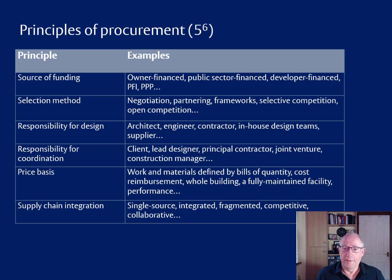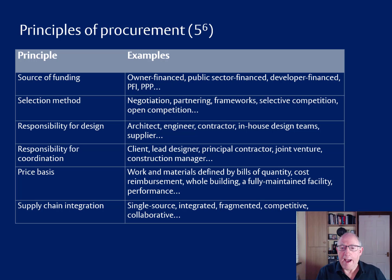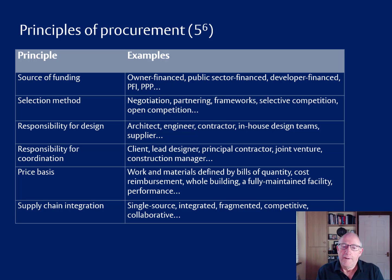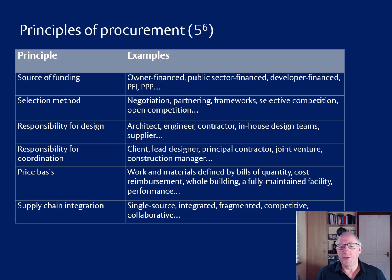That's an interesting thing — fifteen and a half thousand different ways of procuring a project, shown on this one slide. Any book you pick up that explains how construction procurement methods work will list six, seven, maybe eight different ways of procuring a project, as if each answer — construction management, design-build, PFI, and so forth — was a complete answer. The point of this graphic is to show that when we identify a procurement method by the contracting, selection, or pricing method, we're only providing part of the answer.